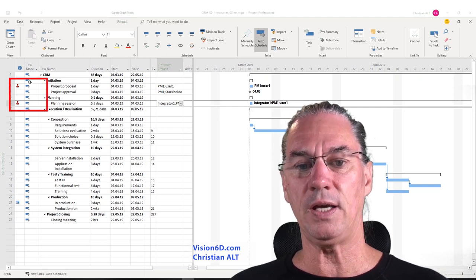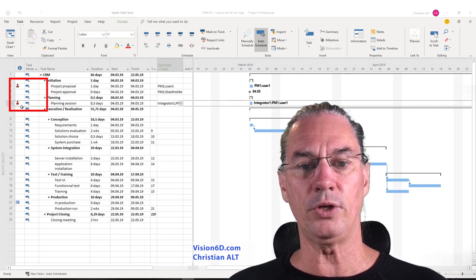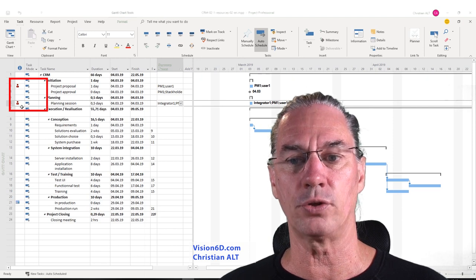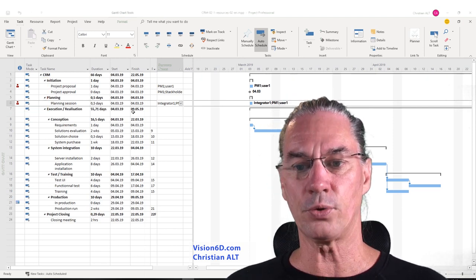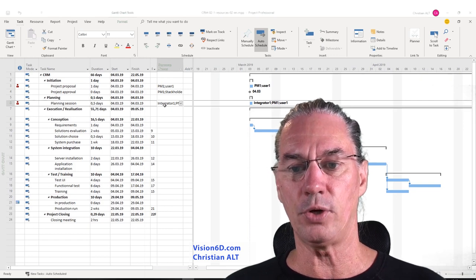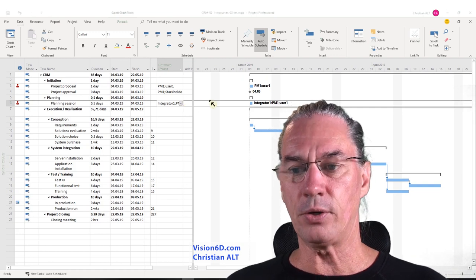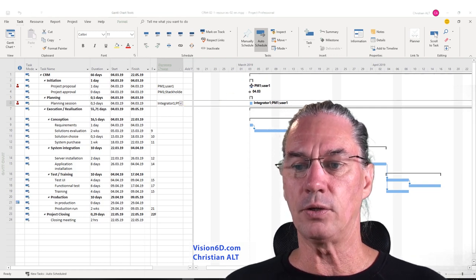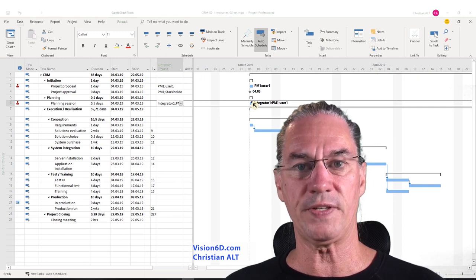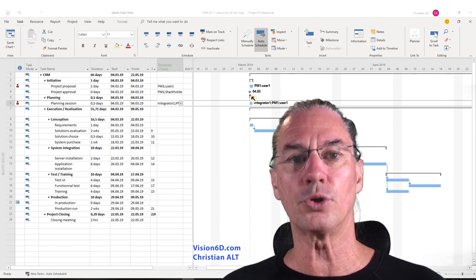What you can see is that we now have red figures that appeared. This is the sign that there is an over-allocation of one resource. The resource that is over-allocated here is the project manager. This is because the tasks don't have predecessors — there is no chronology between the tasks, so I'm going to correct it.